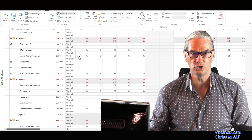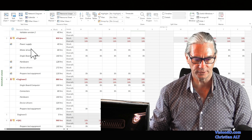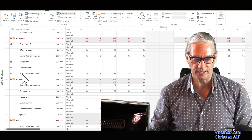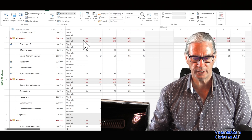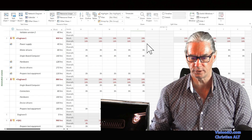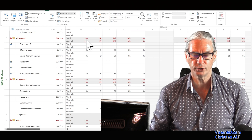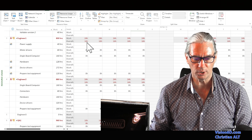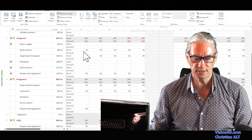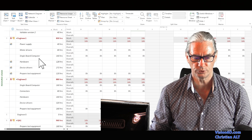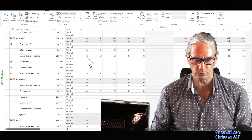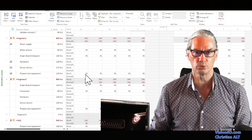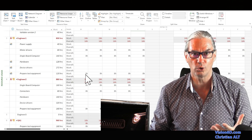There are still a few tasks for engineer one which are over-allocated: conception of the motor drivers, the single board computer, and preparing some tests. During those days spread over two weeks, every day he is scheduled to work 24 hours — so there are 16 hours of over-allocation. I propose that for motor drivers he works 2 hours, on the single board computer — the main part — he works 4 hours, and for tests he works 2 hours. This is one way to solve it; you can of course find your own approach.